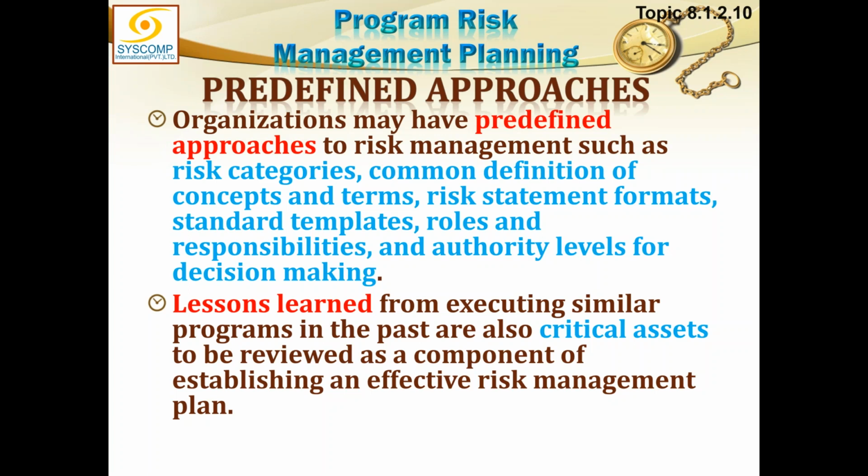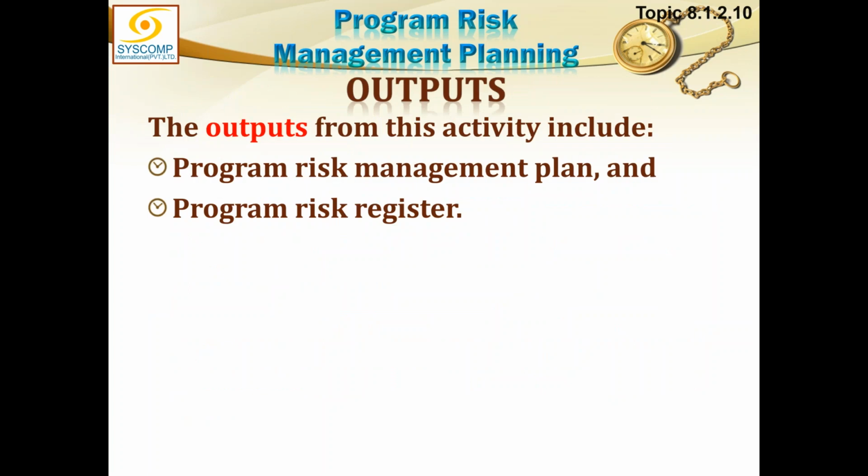But for those where these things are not existing, you must consider all of these things for better risk management. Lessons learned from executing similar programs in the past are also critical assets to be reviewed as a component of establishing an effective risk management plan. The output would be the risk management plan and the risk register.